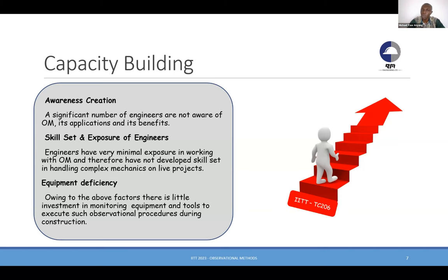Yeah. I think one of the issues we have here is the complexity of infrastructures. It's a scale of how much I am saving in relation to how much the foundation costs in total. So it depends on the complexity. Sometimes you have a not so massive building and then you go and spend on instrumentation, and it becomes an extra cost instead of saving cost, because you may save nothing in relation to the total project cost. That's why, in a place like Accra, it's picking up in terms of infrastructural uplift. Once we get there, the exposure and awareness will come along.